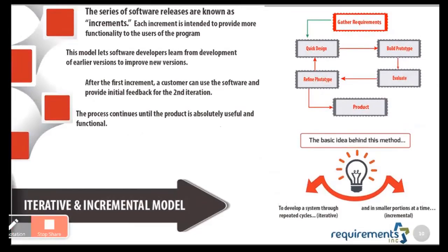Before we jumped into Agile, we tried a few different things. One of them is called the iterative and incremental model. This would prescribe that you just don't do this 1 2 3 4 5 6 all at once, big bang, and then be done with it. Before you make the problem statement and start planning, break down the problem statement into different pieces. Let's say I have a large project that I'm building. I'll break that down into probably 4 sub-projects: sub-project A, sub-project B, sub-project C, and sub-project D. Now, each of these sub-projects is going to have its own cycle of 1 2 3 4 5 6.